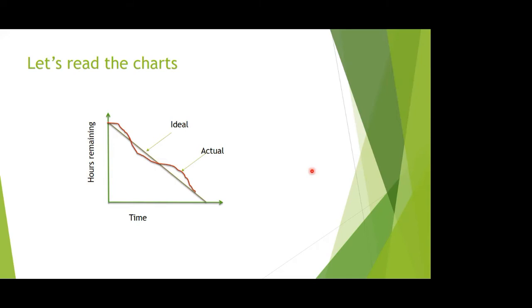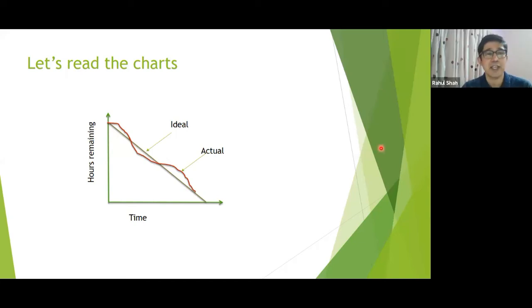Yes, I think they would be able to. It looks like in the initial few days of the sprint they were not able to complete as expected. Then they moved a bit fast. You can see that the red line came down below the ideal line, and again there was some lag in the stories completed. And at the end, it looks like they are on track to complete the stories in this sprint. Wonderful. Thanks, Satish.